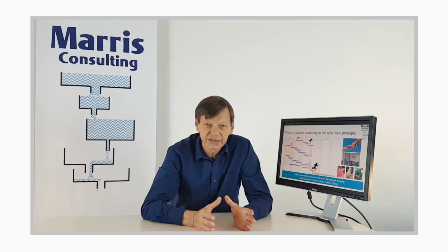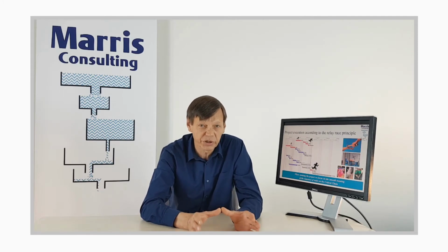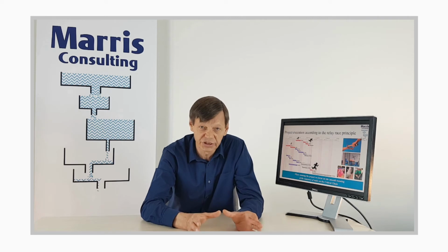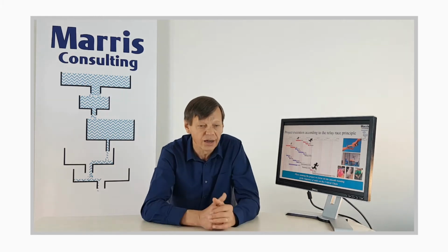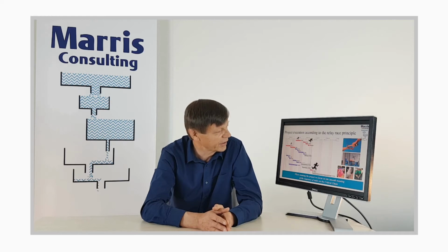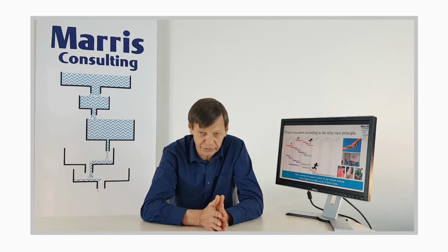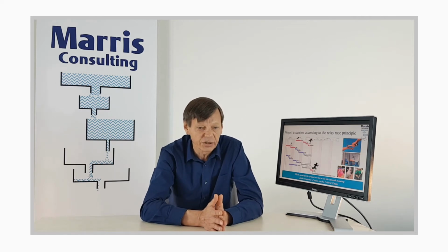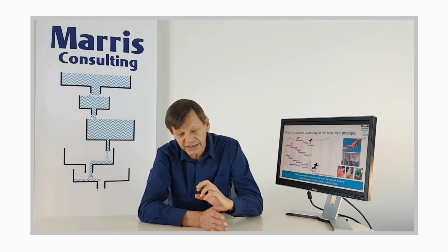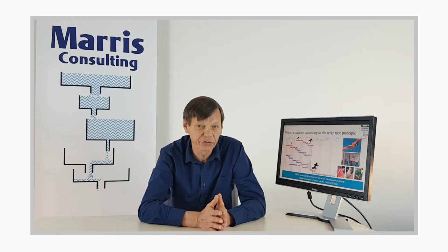This remarkable object was there to say, watch out, this person is working on the critical chain, please do not disturb, because they are defining whether that project is going to succeed or not. So it's a way of visualizing clearly where that critical chain is. And you can have, of course, several projects in a portfolio, and you'll have several mascots going through the company.